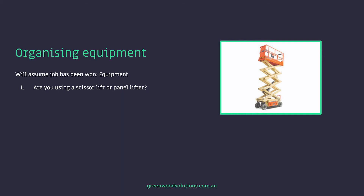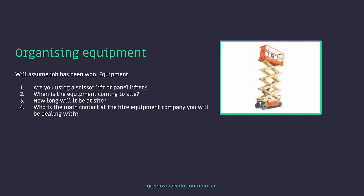What about organising equipment? Are you hiring a scissor lift? Where's it coming from, when is it arriving, how long will it be on site, and who's the contact at the hire company? Does the scissor lift have all-terrain wheels? Case in point — on a big project, a scissor lift was ordered and came to site, but the site was dirty and gravelly and it didn't have all-terrain tyres. We needed another one, but all the all-terrain scissor lifts were hired out for the next month. Who took that into consideration?